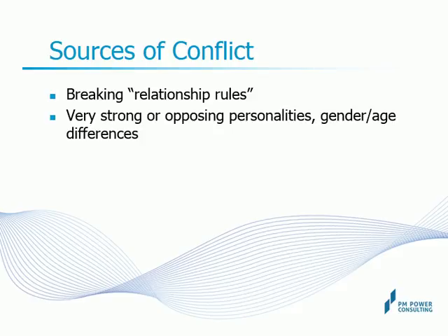Role incompatibility is another source of conflicts in organizations. We can think of many examples for this. When I was a project manager, I wanted a high-end test server quickly to meet customer needs, while the procurement function was driven by the organization's mandate to reduce costs and wanted to take their own time to get the best prices from vendors. Another example is the tussle between the development lead and the testing lead.